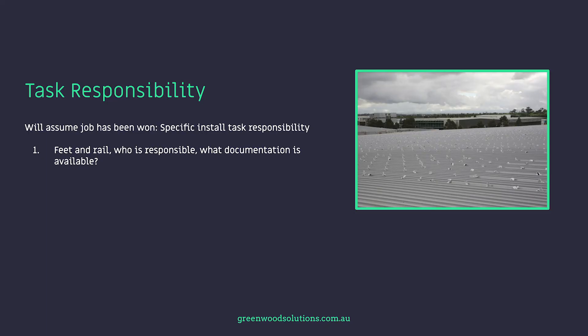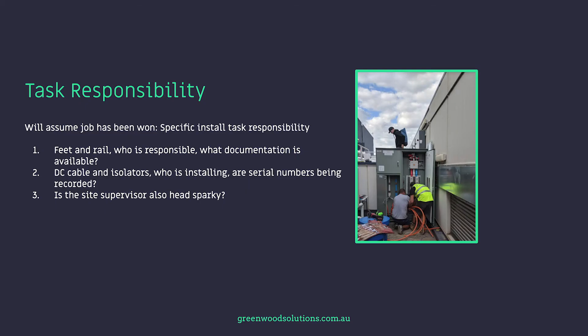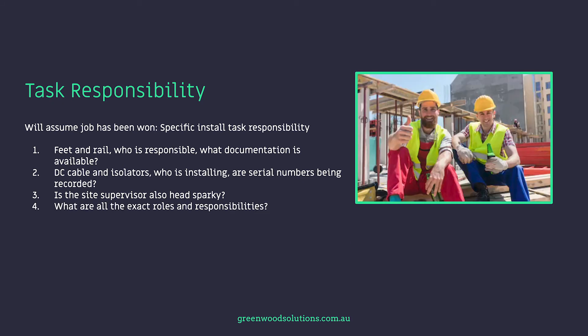Assuming the job has been won, consider task responsibilities. Who's installing the feet? Who's getting the feet up on the roof? Who's handling DC cables and isolators? Have the serial numbers of the DC isolators been recorded, and if so, how? Is the site supervisor the head sparky, or is the head sparky the site supervisor? It all comes back to RACI — who's responsible, who's accountable, who's consulted, who's informed.